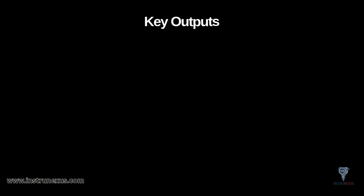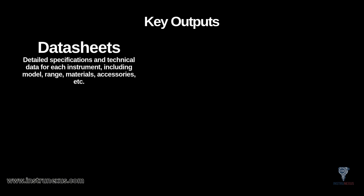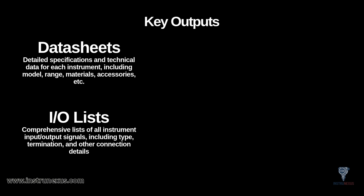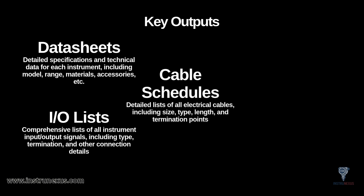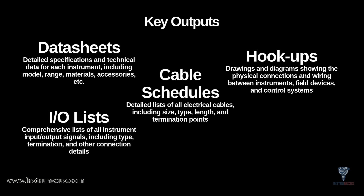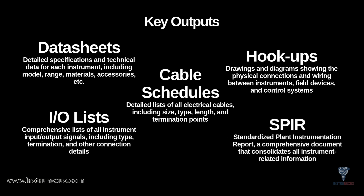Once the Instrument Index is populated, it becomes the engine that generates all your other key outputs. From the index, you will create the Instrument Data Sheets — the detailed technical specifications for each device, including its model, range, materials, and accessories. You'll generate your I/O lists, which are comprehensive lists of all the input and output signals including their type and connection details. The index is also the source for cable schedules, which detail cable sizes, types, and lengths, and hookup drawings showing the physical wiring and connection details. It can even be used to generate SPIR, or Standardized Plant Instrumentation Report.